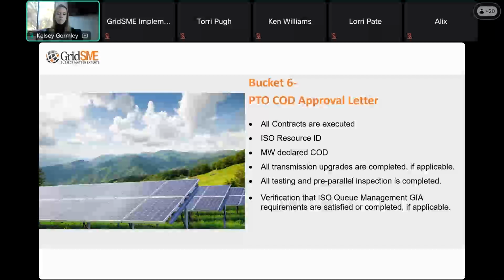That's another requirement that's different from CAISO point-to-point testing, but the utility will essentially have their own version of point-to-point testing with their RTU at the site as well. And all other outstanding issues, right-of-way, insurance, operating agreements, all of that has been resolved with the PTO. So this is them saying, you've met all those requirements and we're giving you permission to go commercial.